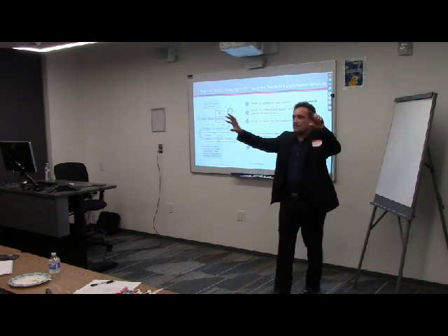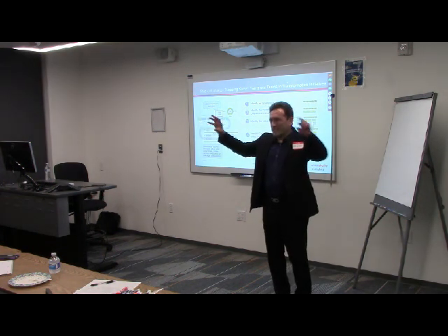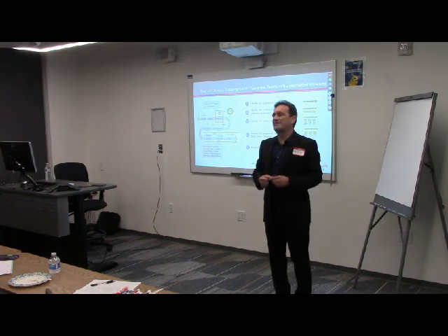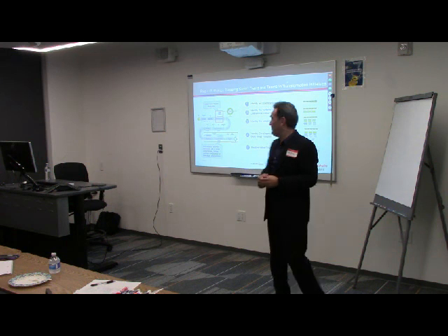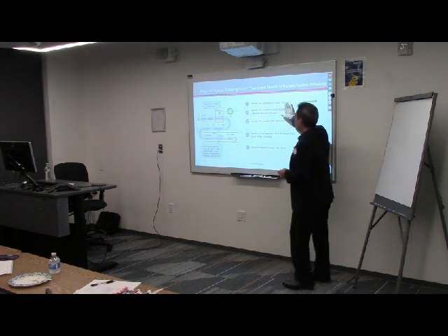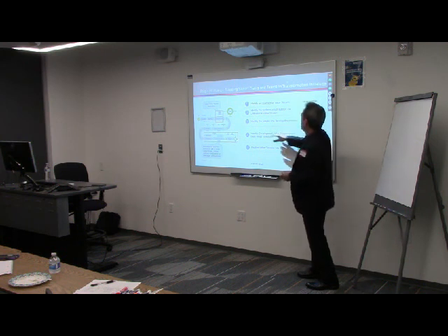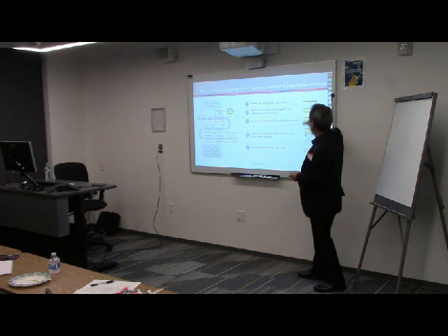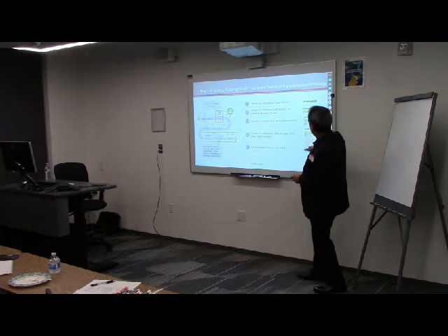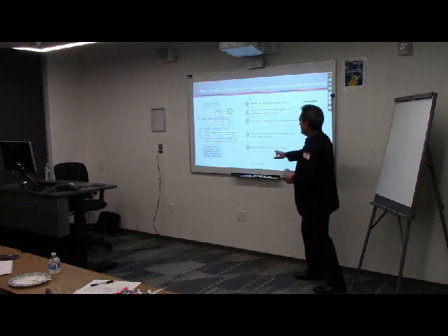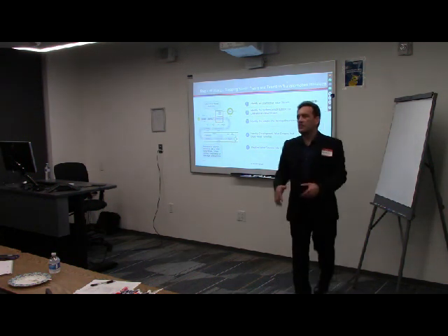Deciding what value streams are best put together so that the teams can all be a part of the same train. Okay? So we start with the operational value stream definition, then we decide what systems actually support those value streams that have to be a part of this, then we talk about the people who are going to be supporting those systems, and then eventually here, the development value streams that will have to be used to build those systems, and of course, organizing them into Agile release trains.